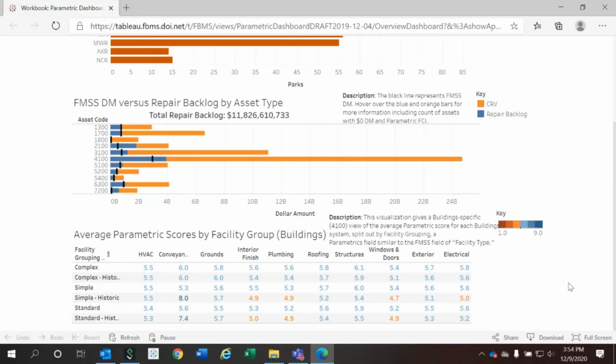If you were going to translate that to federal highways and try to alleviate the problem that you're running into where the estimates just don't even come close to matching what your projects are, we need to be able to divide that up into facility groups. And the direction that they're headed in is that they're going to be looking at the terrain. So GWMP is an urban terrain. Right now, the average factor they use for road estimates across the portfolio is 1.56 or 1.59, I can't remember for sure. If you're looking at urban terrain, it's something like 4.26 for a reconstruction job, as opposed to that 1.59. So there's a big difference if you start looking at facility groups. And it is my understanding that that is where Federal Highways is going to go for their total portfolio.